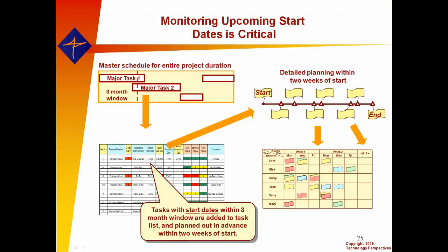So again, this is all connected. If we do this in a rigorous fashion, the master schedule drives that upper left-hand planned work template, which is just a task list derived directly from the master schedule, and then that would drive the Post-it notes that are going on the center of the board. It's all connected together with task ID numbers. So if I'm on schedule in that center of the board with those little Post-it notes, I know that I'm on schedule to the master schedule.